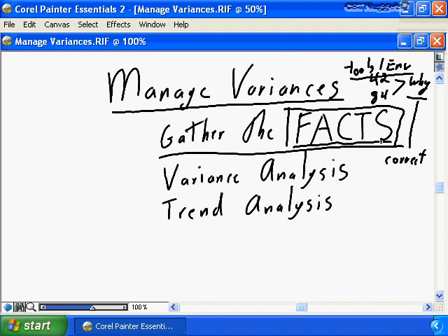We did an estimate, we thought it was 42, all of the tools, all of the environment are correct, but it's simply not enough. We are going to have to accept the fact that the project estimate, at least in this particular instance, was bad, and we need to understand that there will be instances where this happens, that there is no corrective action, and you simply accept the fact. Going forward, we are now 42 hours over on our budget, which means we're 42 hours worth of labor over on our budget. That leads us into the variance analysis.